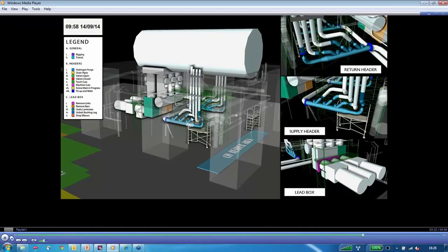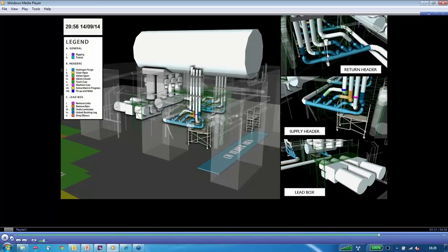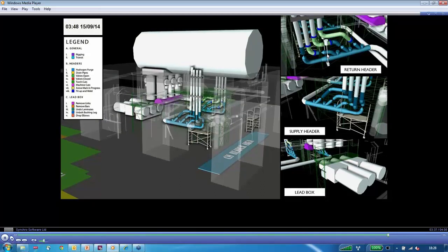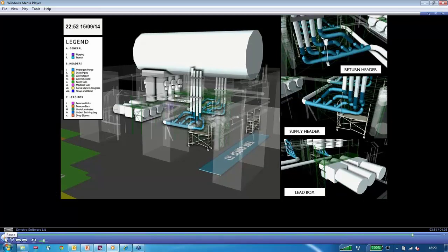So again, based on the planned schedule, we're just at the start of day 2, and on both sides, we've hit our major target. And each individual pipe cut, these Ariba marks, were all carefully reviewed, timing, duration, number of people. But the guys would be in the field managing the work, providing their input, saying, no, there, I need more time, or I need less time. And so based on this, we came away with a pretty good sense that, yes, we could do this. It's not out of the question that 72 hours is a viable target.